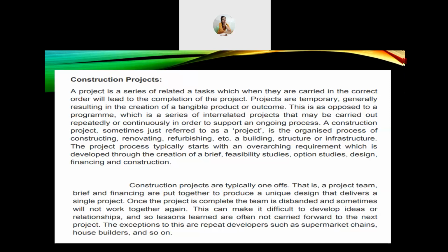Construction projects are typically one-off. That is, there is one project team, brief and financing. The project team, the brief and the financing are put together in order to produce a unique design that delivers a single project. Once the project is completed, the team is disbanded or dissolved and sometimes will not work together again. This can make it difficult to develop ideas or relationships, and so lessons learned are more often not carried forward to the next project. The exceptions to this are repeat developers such as supermarket chains, house builders, and so on.